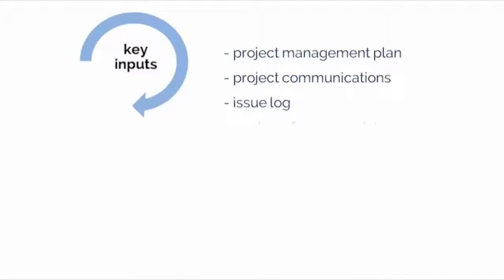As part of controlling communications, we want to make sure that all stakeholders are made aware of the issues, have a common understanding of them, as well as help prioritize them. This log will provide everyone with a clear sense of who is handling the issues, how they are being resolved, and target dates for resolution. The goal is to remove all obstacles so the project can progress as planned.